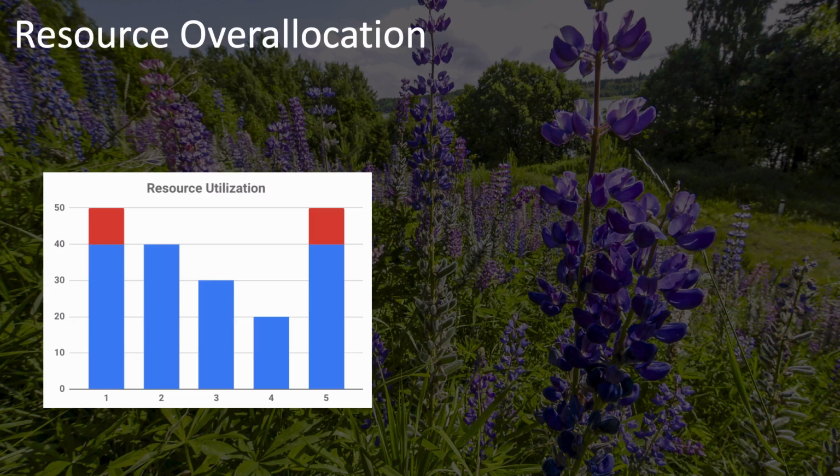In this case, as you can see on the left, it goes from 0 to 10, 20, 30, 40, and 50. Suppose those are hours, and that you can't use these resources for more than 40 hours a week. So you have a problem that needs to be resolved.